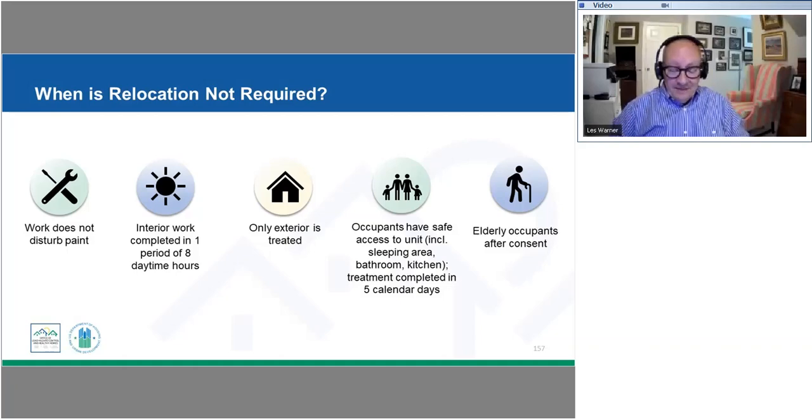So I think that's an upfront thing that you need to be able to evaluate on: what's the availability of clearance testing and the turnaround time on results? Is this something minor where we can accomplish it in a couple of hours in the morning, have the cleanup done, have the clearance tester come in and legitimately get the results back by the completion of that day?